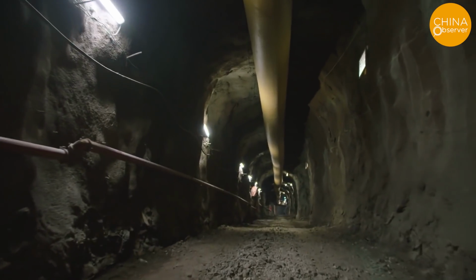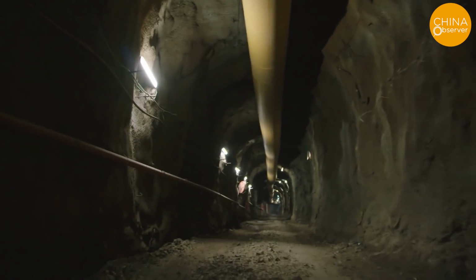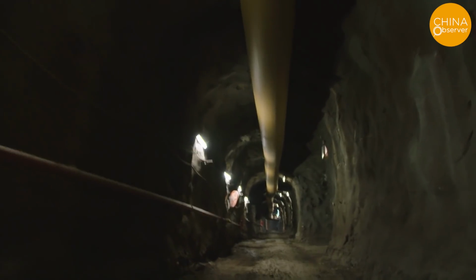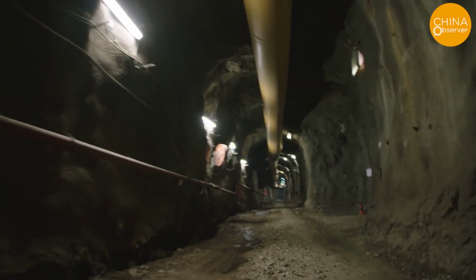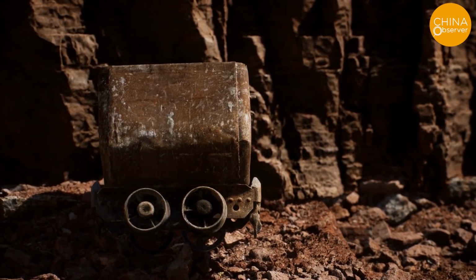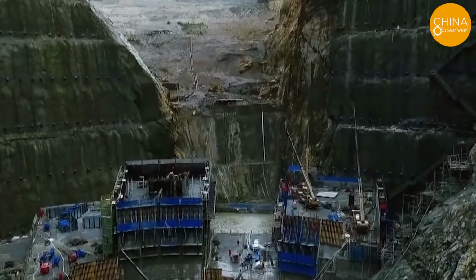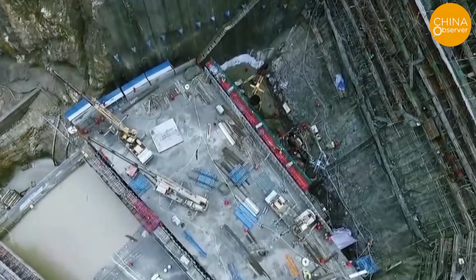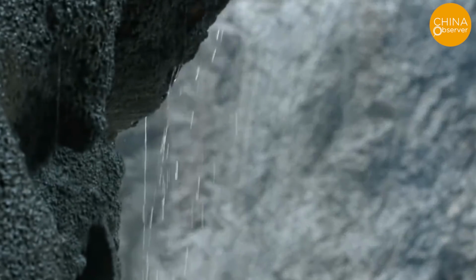The excavation encountered carbonaceous slate, and the rock has extremely low compressive strength. Although supported by section steel, the tunnel roof collapsed as high as 12 meters. Accidents had occurred during the excavation phase, and the rock body has poor integrity and low strength, but the rock body has not been reinforced. According to the design documents, the Eping Hydropower Project has a construction period of 4 years. However, with the joint efforts of the owner, construction company, supervision, and design companies, the four major components of the project have been nearly completed in 2 years.